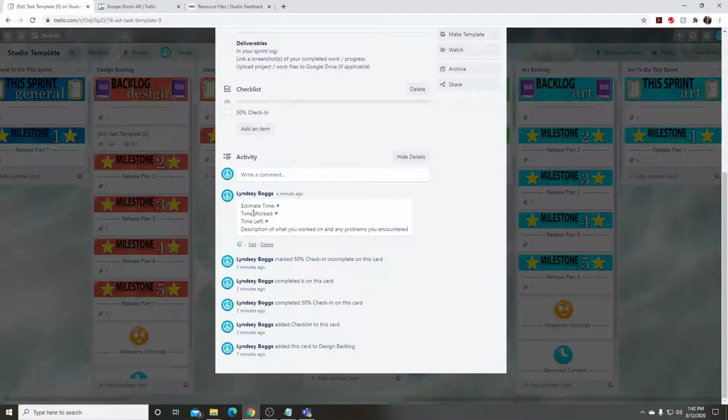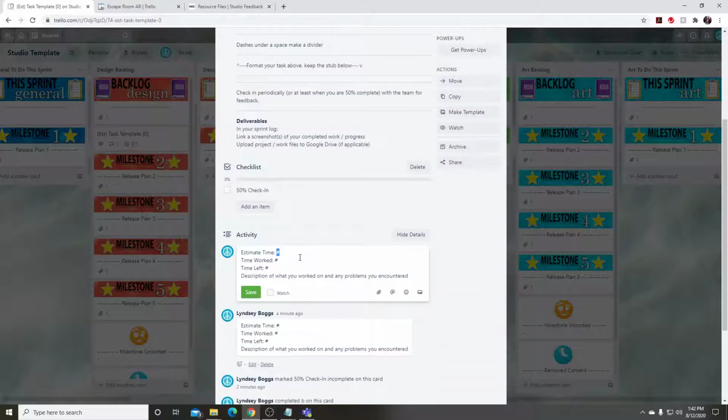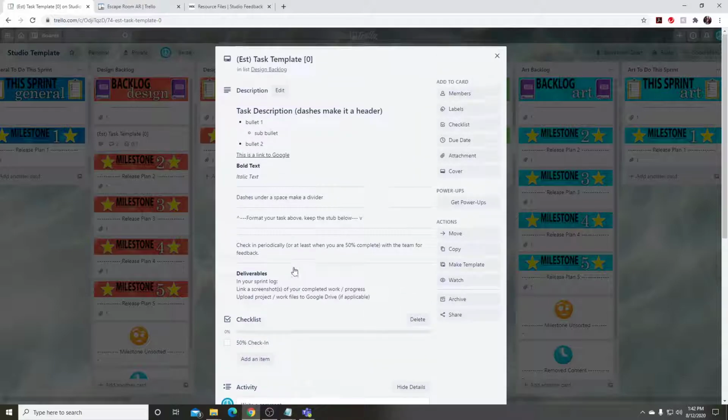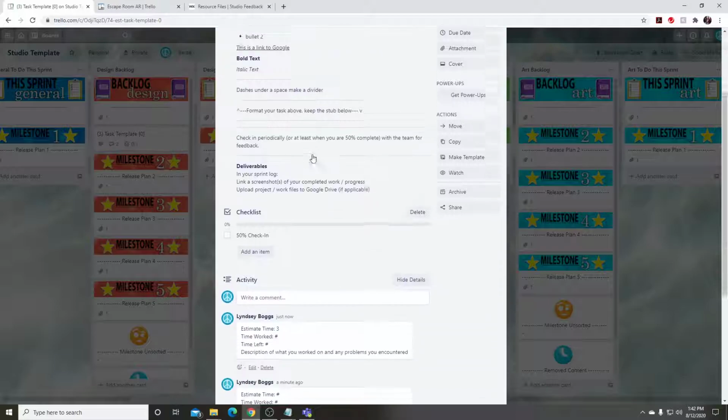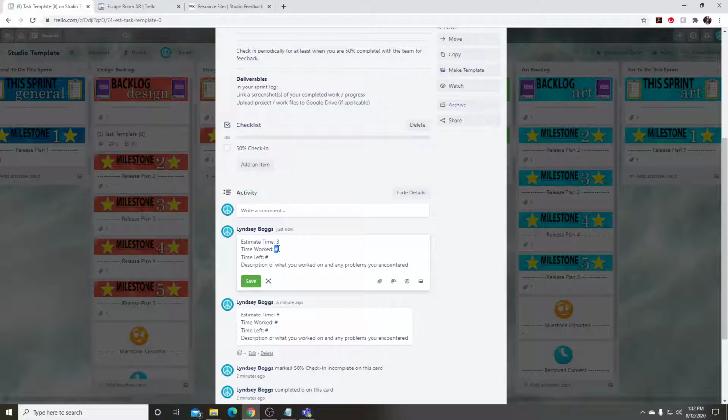So when you start out with this comment, you would say the estimated time would be the same as that. So let's say this is a 3-hour task, okay? I'm going to save this comment, but I'm going to come back and edit it. So this is just an example. We got here a 3-hour task with 0 hours worked on it so far. Say within this session, I worked half an hour, so logic would dictate that there's 2.5 hours left.